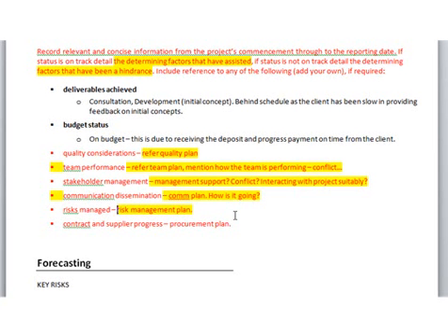The next is risks managed, and here you look back at your risk management plan. So you pull open your project plan, look at how you planned for risks, what risks have actually materialized and how you have handled them. Sometimes you might have done all this great risk planning and none of these risks popped up at all, so you just make a comment of that. Otherwise you might have been bombarded with all these risks you didn't even think of, so then you would have a bit of a chat about that and maybe make a recommendation about the future, and that the next time you do a project like this you'll include these other certain risks.